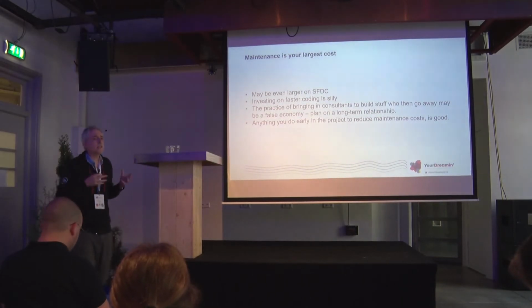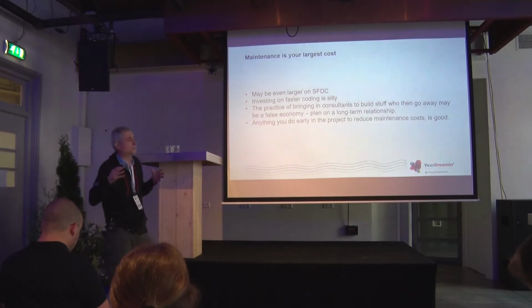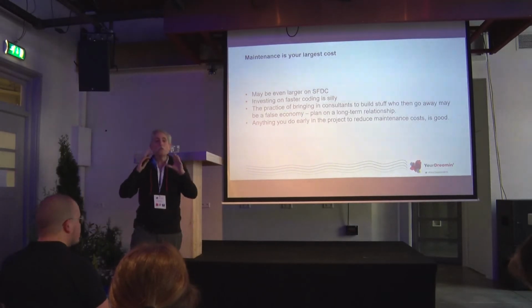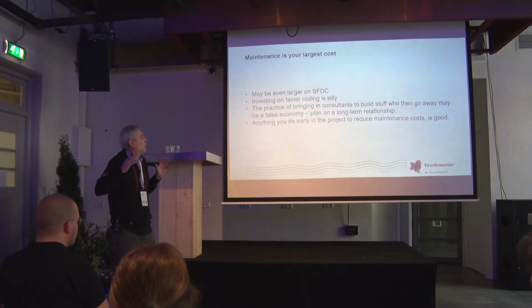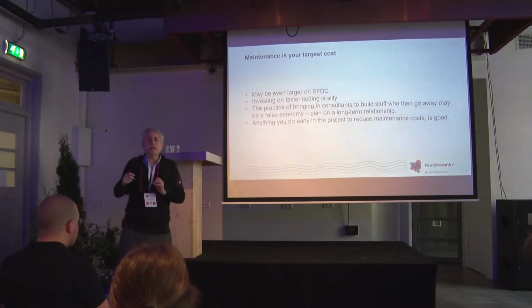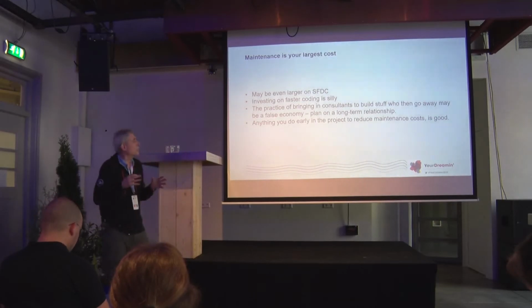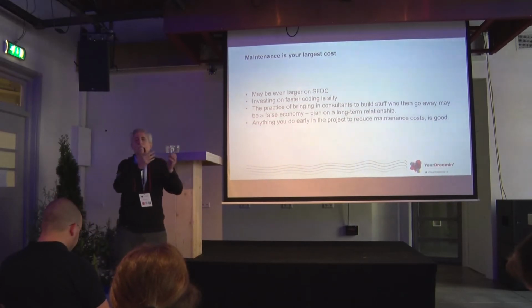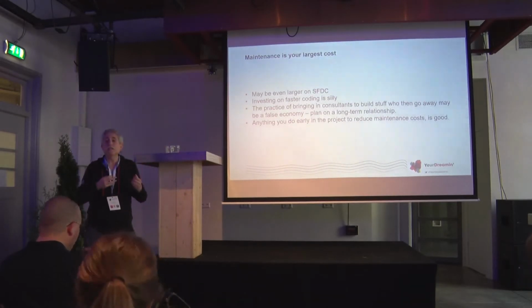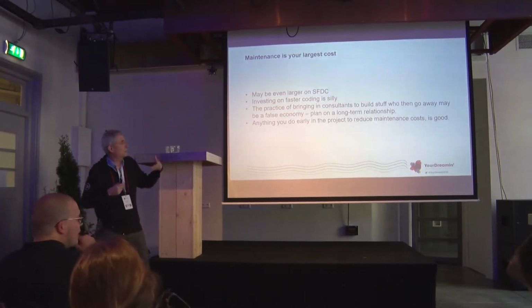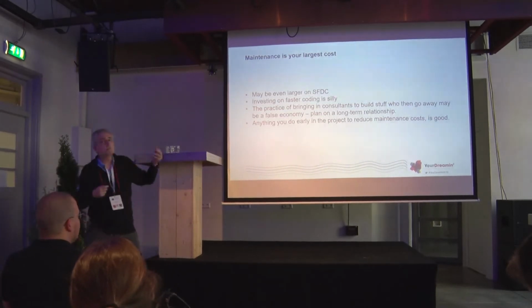So when you're thinking about bringing in a consulting firm to work on stuff, which there are many great reasons to do, always evaluate them not just on what it's going to cost to do the initial build and the initial project, but think of them, do I want to be married to them for a while? And budget accordingly. Budget with the assumption that I'm going to be spending another 50% on the maintenance side.